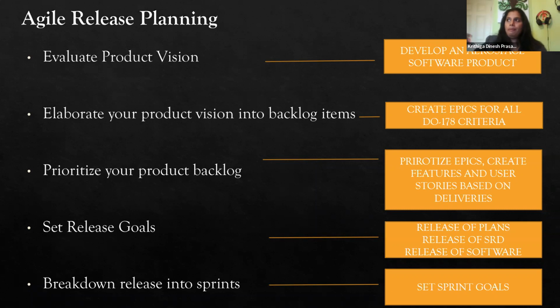For any big aircraft customer, right? We can have PDR, CDR, PPR, and we can also have SOI 1, SOI 2, SOI 3, like that. So determine your complete vision of your product backlog, and determine your milestones that you need to achieve. And then once you determine that, then go add all the epics and all the user stories.